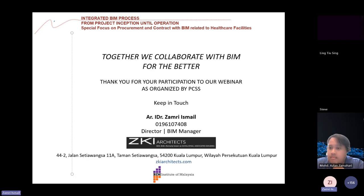So when you ask about the scheduling, yes, that is also important, because once you have all the design done, then you can do a proper sequencing or simulation of the construction process. You know exactly where to source, what should come first, and what the requirements are. It may relate to how you claim for the project, because you can link that to your financial cash flow as well for the contractor, because there is no point constructing something that you cannot claim. Otherwise you may have to wait until the whole thing is complete before you can claim, and that will affect your cash flow. So all this information can be linked to all parties concerned, the stakeholders. Because in BIM, the key letter there is I, which is information, and how you use it to your advantage.